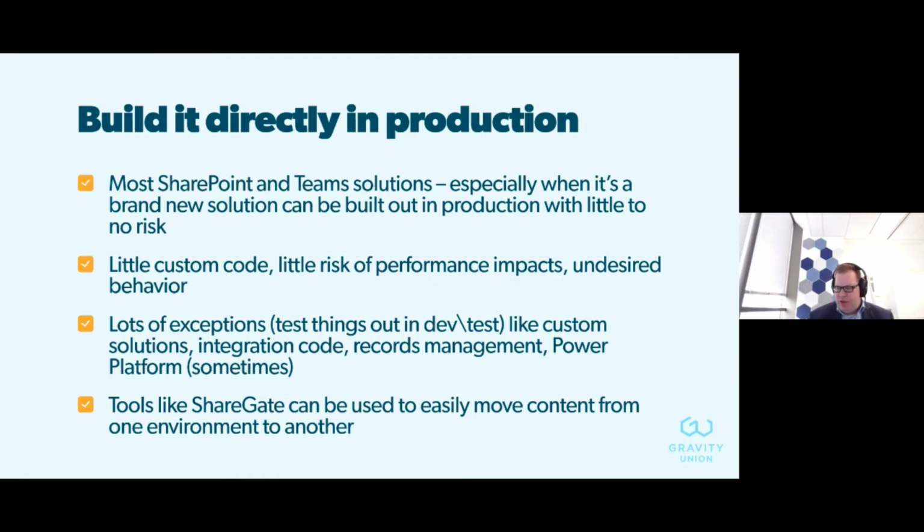So this notion that we need to have a dev environment and a staging environment and a pre-prod environment and a prod environment and move our solution through those environments was true back in an on-premises, custom solution, where there was a risk that when we deployed our solution, there'd be performance issues or bugs and stuff like that. Because we no longer have to manage the infrastructure for these solutions, in many cases, especially if it's a brand new site, say you're going over to the human resources department, and they have nothing in SharePoint Online yet, go into production, just build it out there, and you can save all that overhead of moving it in between various platforms.